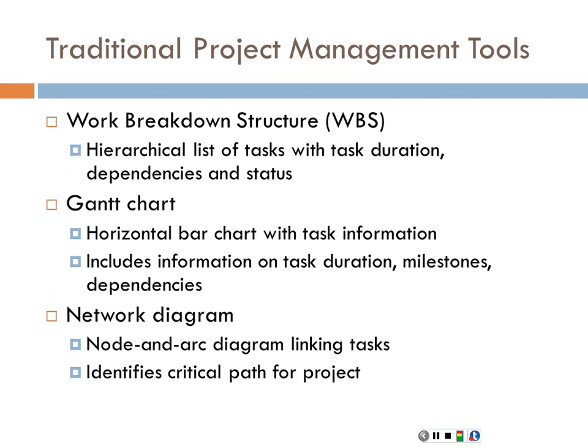Okay, so some other things that are going to be quite relevant and useful for you. One is this: as you're breaking down how this project is going to look overall, you want to have a plan for how you're going to execute various phases of this project. It breaks this down into the component tasks. With that, a couple of elements here that they recommend. One is this work breakdown structure. Basically just a hierarchical listing of each of the tasks. Okay, whatever, 1 through 50. These 50 things need to get done, need to get done in this order, and here's how long each one is going to take.